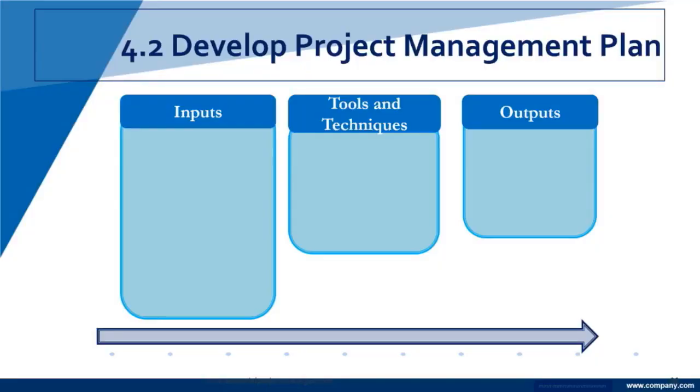Our next process is to develop the project management plan. Now here we have inputs of the project charter. So there is the assumption that we have a charter, it's in place, and it has fully authorized. That's important to understand, that to have a fully developed project management plan, that is there because now we have the authorization. The project manager is engaged. We've identified certain things.